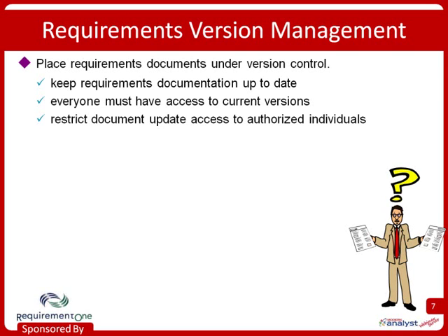So one way that we help make this possible is we don't just give everybody read-write access to the requirements repository. Only certain people should have update access who are authorized to do that, to really make sure that they have a central point of controlling the changes that are made so they get communicated to people. So how do we do this? Well, automated tools are best. So the best approach is to store the requirements in a database of some kind, again, like a requirements management tool. And they'll give us a lot of aid in keeping track of versions.